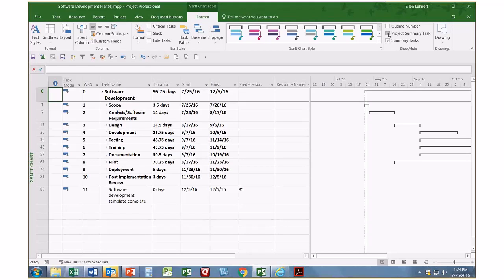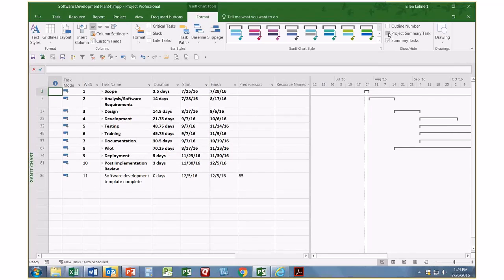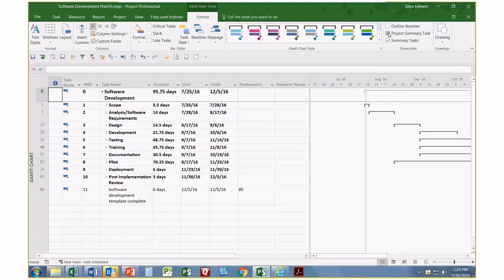You really need to be using this task. So you just turn this on. You can see how the level 0 shows up. And that will actually give you a lot more reporting. It is also extremely necessary if you start combining projects. It could actually skew some things when you're combining projects. So I would very much like you to consider using the project summary task.